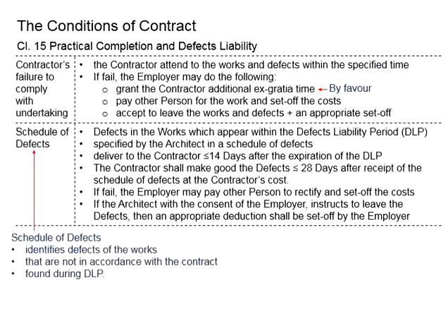The relevant works and defects will need to be specified, and the contractor will need to attend to the works within the specific time. Let's say now the contractor fails to rectify those within the stipulated time, the employer can choose one of the following responses to the failure of the contractor to comply with the undertaking.